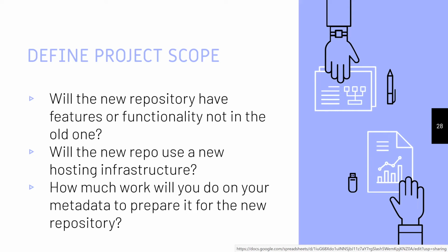Look at what transformations might be required. Are you going from MODS to Drupal fields, which we are? And who's going to do that work? How long will it take? Have they started already? Do they have the tools they need, the experience they need? All these questions that you need to think about. And what tools can you use? OpenRefine is one. We used Google Sheets for some of it. So there's a lot of choices there.